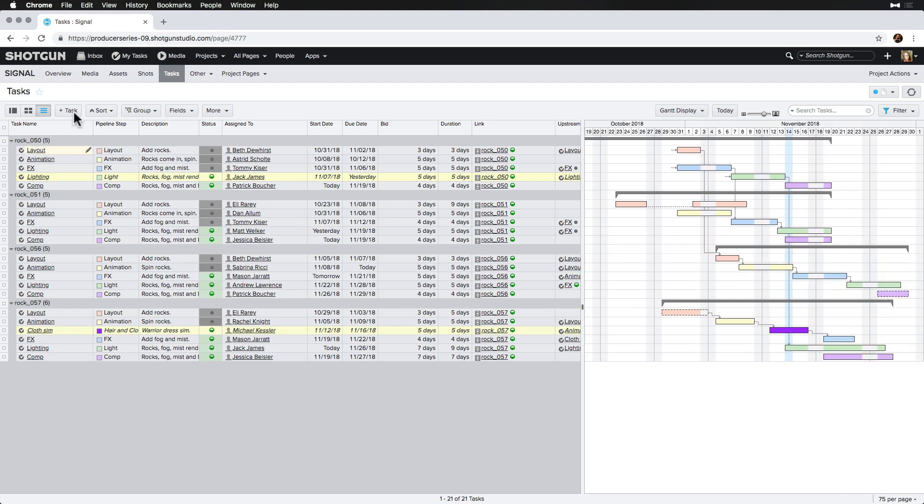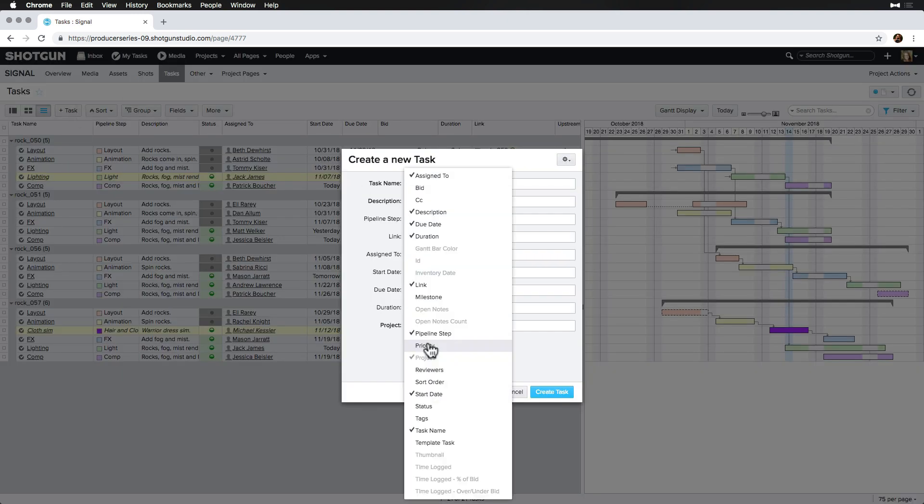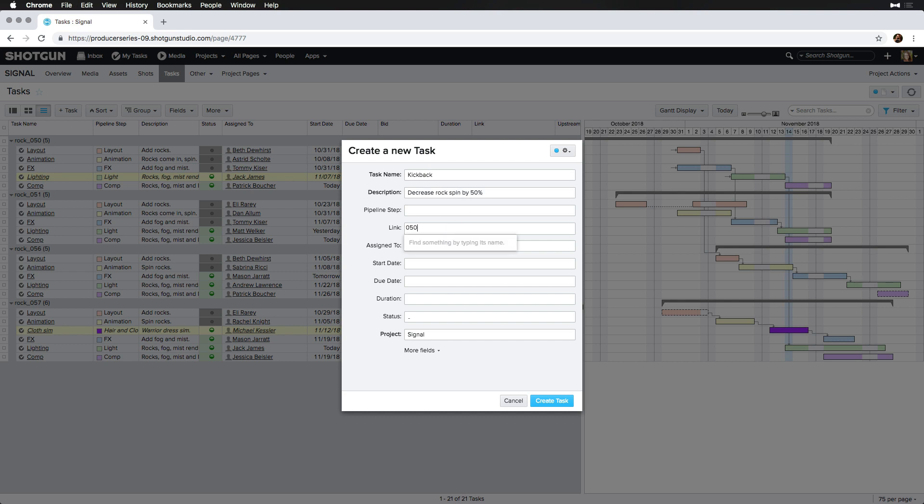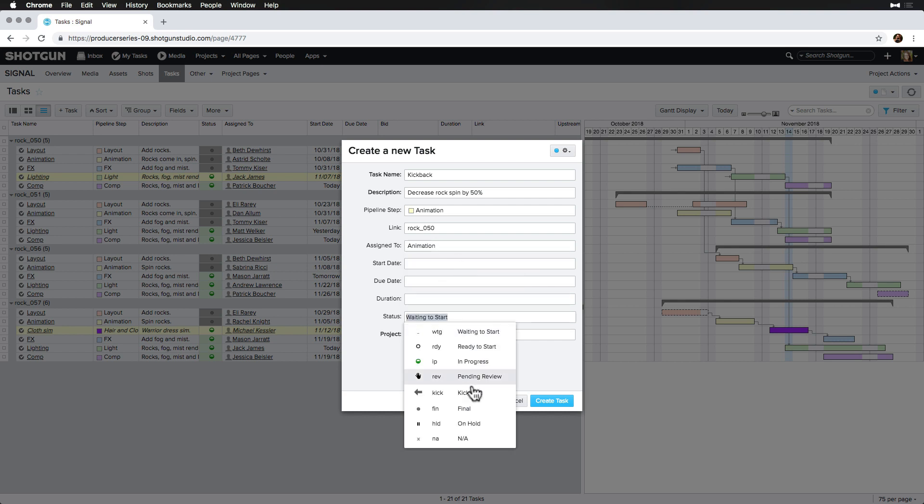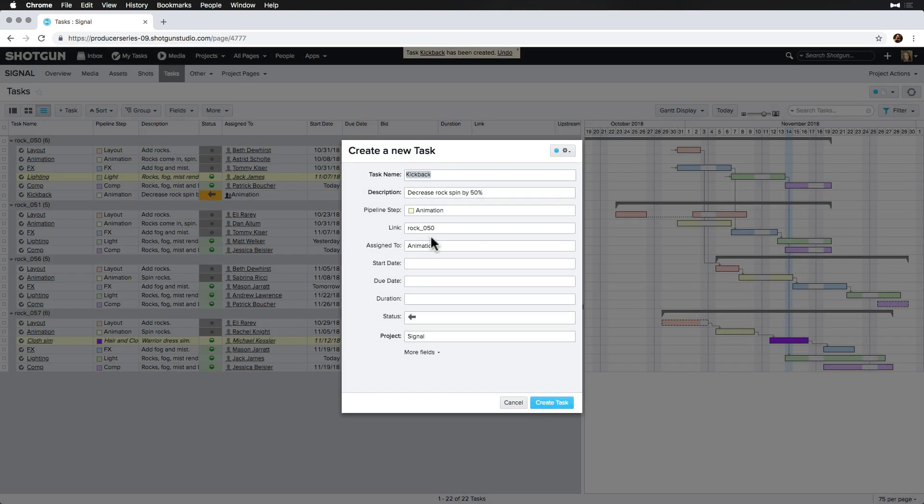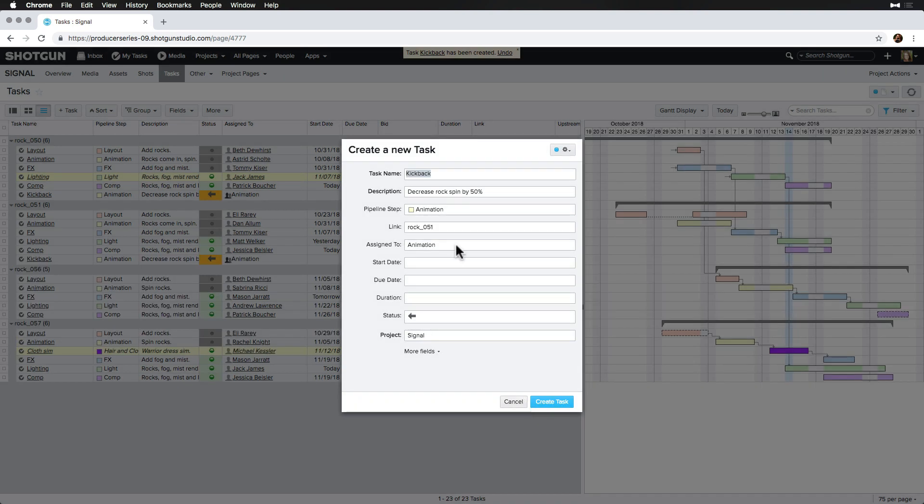We create a task called kickback and enter our description, decrease the rockspin by 50%. Link it to the shot in animation pipeline step, assign it to the animation group, make sure that our kickback status is selected, a status that we customized in our project tracking settings. And then we hold down the Alt-Option key on our keyboard and create our first kickback while keeping the values and creating the next one since these kickbacks are similar in nature and we just need to update the shot links.